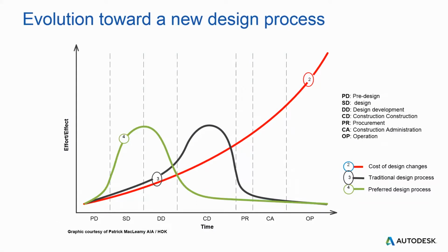I think it's important to just cover this again, just to see that in a traditional construction process, the cost of design changes increases the longer a project goes on. So whether that's at an early design stage, detailed design stage, and then construction stage, as you can imagine, to make changes to detailed drawings or to make changes to work on site that's already been done, it's obviously going to be quite a cost. And whether the contractor or the client carries that cost, regardless, you've lost time, and it's a loss of finance within the project as well that we'd hope to avoid.